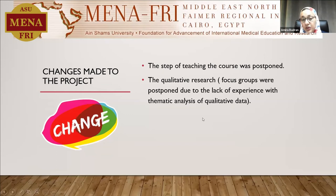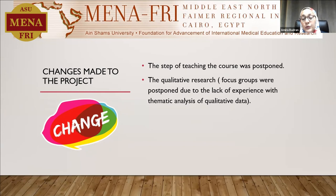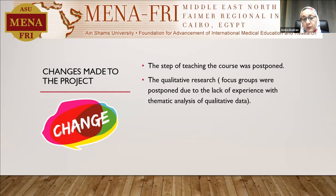Changes that were made to the project: the first change was that the step of teaching the course in the next year was postponed due to the delay that occurred in our timeline, so we won't be able to finish and teach the course next year. Also, the part concerned with qualitative research — the focus groups and group discussions — we weren't able to complete on time because we lacked experience with the thematic analysis of qualitative data. This was a significant problem we faced.